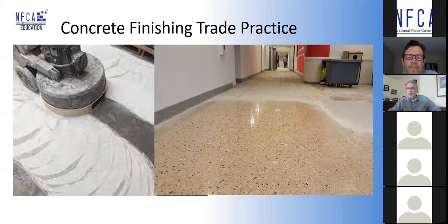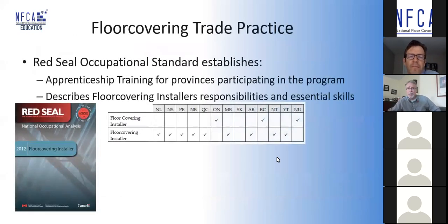These guys also perform the grinding and patching to repair out of tolerance work from the wet finish concrete people. That would be a direct payment from the wet finishing people to the dry finishing people. So it's an expense to the wet finishers. And trust me, they don't want to be paying for corrections if they know what they're doing. They're going to try and get it right the first time, like almost anybody else on the job site, right?